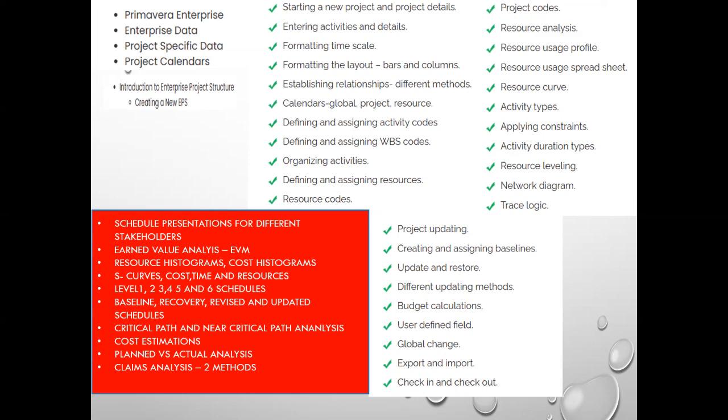Then in one click, you take all the data from Primavera to Excel, and you finalize it in Excel by adding some profit margin, some contingency reserve, and some management reserve. Then you come to the actual cost we need for this project, both direct and indirect, plus the profit you want to add. Then you can finalize your budget for the tendering or estimation purpose.